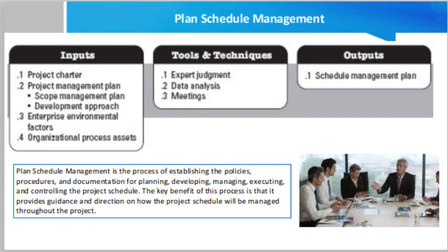Release and iteration length. When using an adaptive life cycle, the time box periods for releases, waves, and iterations are specified. Time box periods are durations during which the team works steadily toward completion of a goal. Time boxing helps to minimize scope creep as it forces the teams to process essential features first, then other features when time permits.